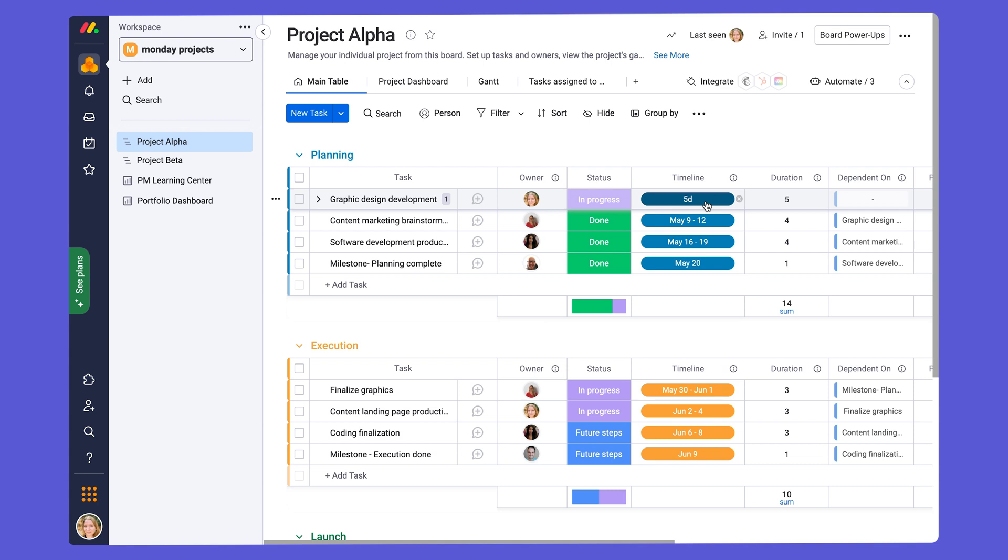Once you have your timeline in place, it's important to keep track of what is upcoming, due, done on time, or delayed. Therefore, to see at a glance where each task stands according to its status and timeline, we have connected those columns. This means that you'll see a visual indication on the timeline as to whether a task deadline is upcoming, overdue, and once completed, it'll be shown as on time or late.